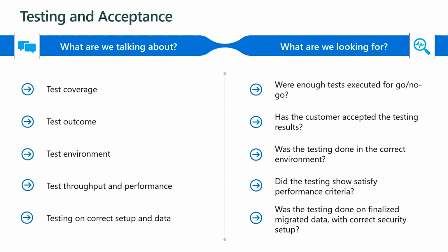So testing includes not only users testing the solutions and accepting the results, but also testing any peripheral solution like handhelds, printing, scanning, or any other external solution connected, and any integrations you've developed. And testing should include performance as well. I believe this is even more critical where there might be a significant peak volume or where there are opportunities for system contention.